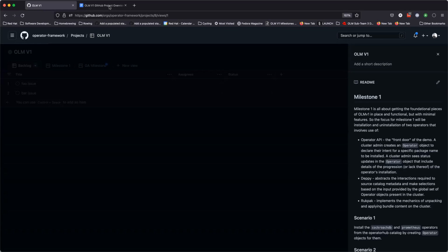But rather than thinking in components and what part of our sub-projects are ready yet, maybe let's think about how useful this is to a certain persona, right? And then these personas get more complex and they want to know more about the system. They need more signals and feedback from the system and more configurability. But maybe focus more on the actual users rather than how we structure our project. That helps to delineate: when is it a good time to call something a milestone?